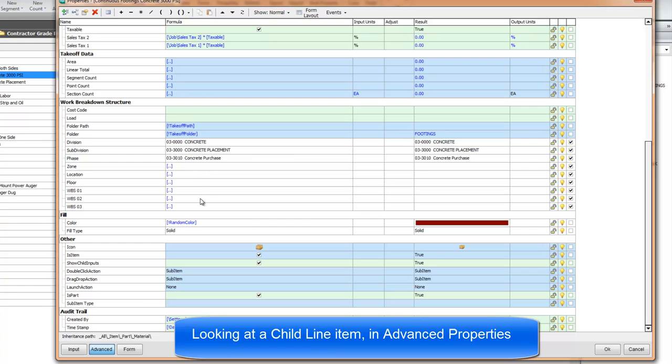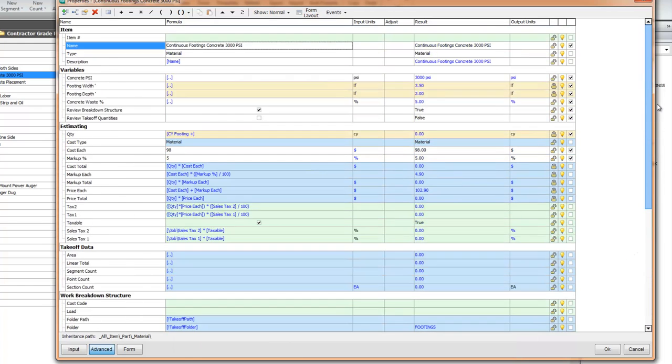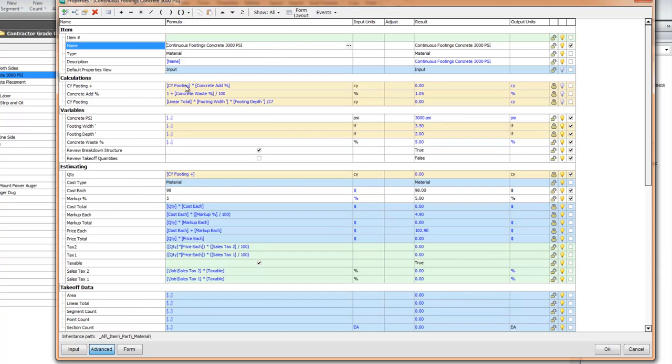Okay, back to the templates. So we've looked in here, and we have seen how in the advanced that the variables are inherited with their values, and same thing for the breakdown structures of the division, subdivision, phase, and then the WBS codes. Now, there's math calculations going on. If I go to the show tab up here, and say I would like to see all, a new group pops in. And this group is the calculations of how we're arriving at the math here.